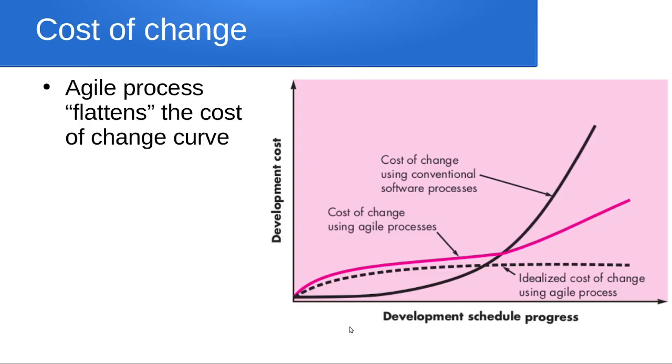If the change request comes in the beginning, then it is really less cost, because till now we have not started modeling or construction. But once modeling is done and a change request comes, it will take more cost. Once construction is also done and some tests are performed, and certain change requests are coming, in that case it is a problem. It will require a huge amount of time.